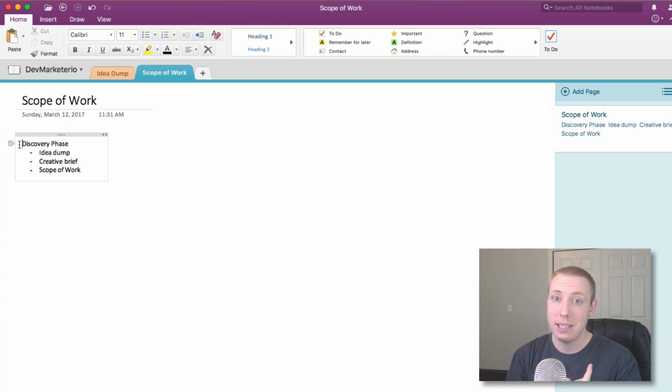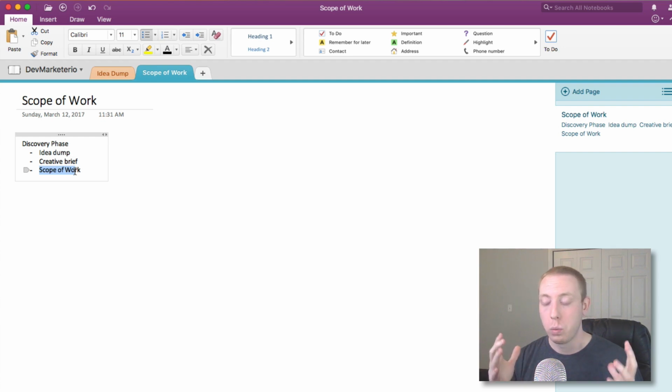As stupid as they may seem, the discovery phase just lays the groundwork for the entire future of your organization and your business, and the happiness that your client is going to have with the work that you've done. So the scope of work is critical because it outlines everything you're going to do. And it's really important to let the client know that if something's not in the scope of work, it's not going to be created.